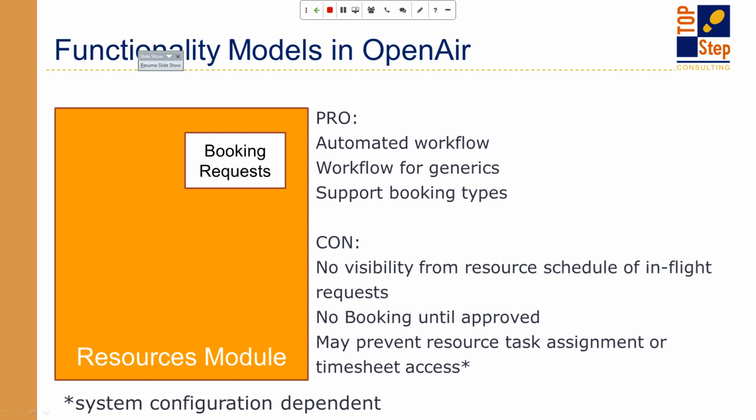So what happens is this pushes the booking process through the organized workflow. And like I said, that really does support the centralized resource management model, and it allows for an automated approval routing and control over when, which, and how the resources are booked.